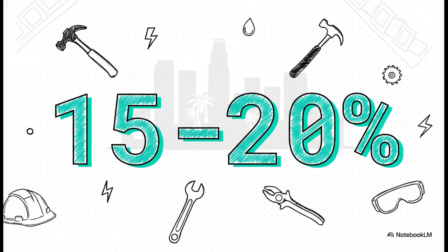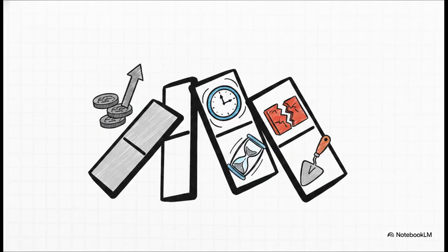And we aren't just talking about general labor here. This is hitting highly specialized, absolutely essential trades like electrical, plumbing, and carpentry especially hard. The domino effect of a shortage like this is incredibly painful. First up, you've got rising labor costs, simply because employers are locked in wage bidding wars for a shrinking pool of talent. Second, fewer workers on the ground means stretched timelines and inevitable project delays.